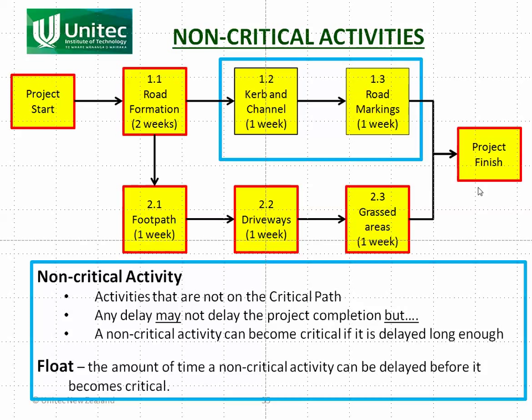We're not going to achieve our objective of finishing the project on time. But if say curb and channel is running a little bit behind, if it's going to be a few days late, we're not going to worry about it as much, because we know that it's not going to affect the project finish. So that helps us prioritize and identify what the main activities are going to be.